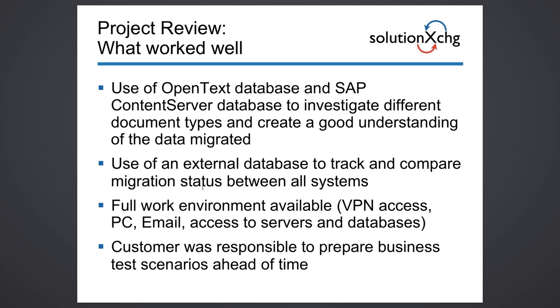We used an external database, a simple MySQL database, to track and compare the status and verify everything. That database was then preserved and is part of the permanent record. So if there should be any audit on this particular migration process, if somebody in 2 years says, what about this document? Where is it? Why is it not coming up? The bank can go back to these records, can go back to this database and say, well, this is the document. We have proof that it was moved from here to here, actually during the migration process.